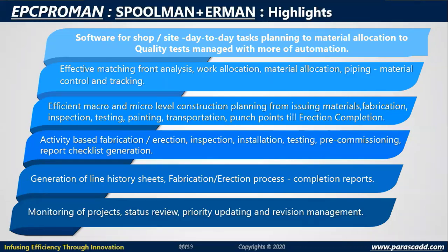Further, this will generate the line history sheet, which is one of the important documents for completing my test packs and for further clearance and pre-commissioning. So the system helps me in achieving all these items.